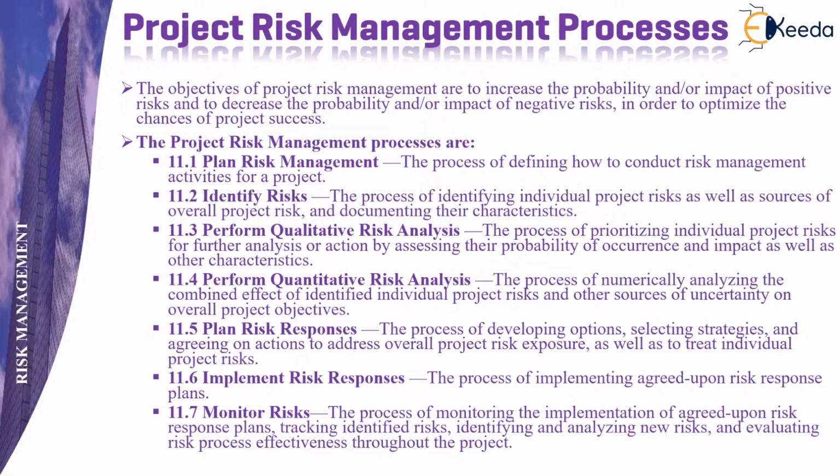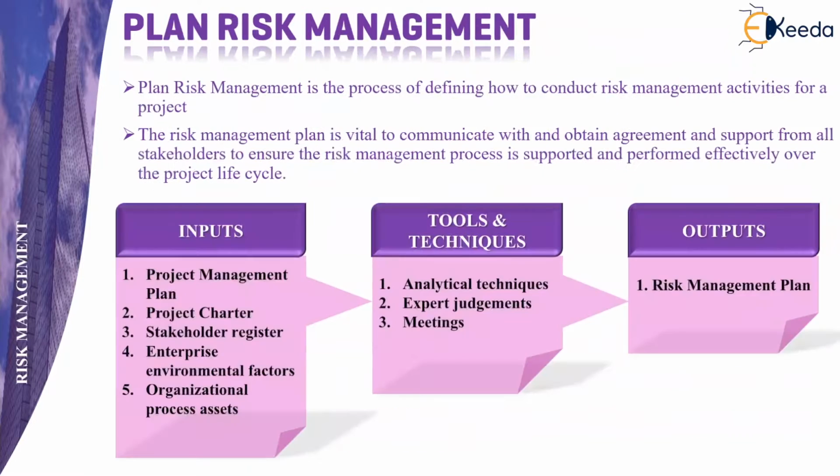Last is monitor risks, which is the process of monitoring the implementation of agreed upon risk response plans, tracking the identified risks, identifying and analyzing new risks that come up during the execution phase of the project, and evaluating the risk process's effectiveness throughout the project. If there is any change, you can directly update the plan.